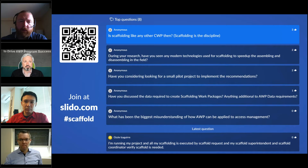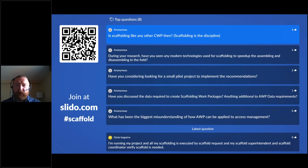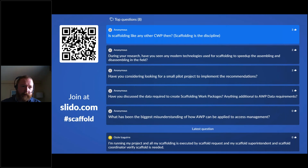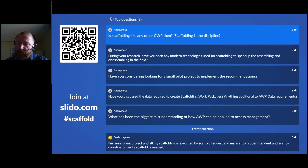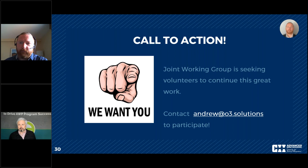Final Q&A: What is the biggest misunderstanding of how AWP can be applied to access management? Traditionally, scaffolding has been seen as a constraint — a checkbox on the IWP form asking 'is scaffolding in place?' Now we're trying to elevate scaffold away from being just that constraint, making it a discipline and a truly coordinated effort, rather than just asking whether a piece of scaffolding has been erected. With that, we are wrapping up. Thank you very much to everyone presenting today and to everyone in the audience for attending. We'll see you at the next webinar.